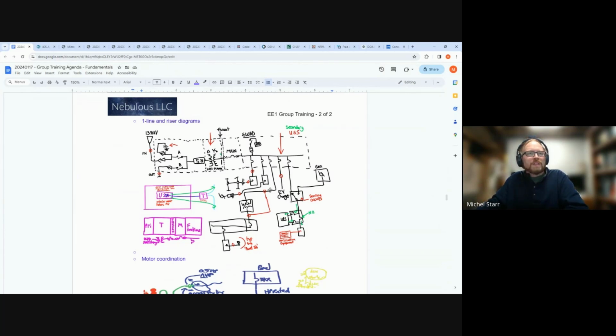And if for whatever reason you have something that's in one or the other and not coordinated, you'll get to ask yourself some questions. I gave the example last night about a generator. If there's no generator in the drawings, but there's a generator spec and the contractor didn't notice, they owe the project a generator, whether they bid it in their bid or not.